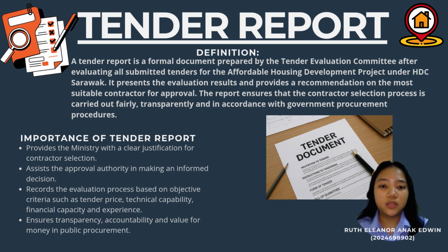The evaluation will not only consider the tender price but also other important factors such as technical capability, financial capacity, experience, and compliance with tender requirements. The tender report will include project information, the list of tenderers, evaluation summary, comparison of contractors, recommendation, and supporting documents. These details ensure that the contractor selection process is transparent, accountable, and provides the best value for public investment.